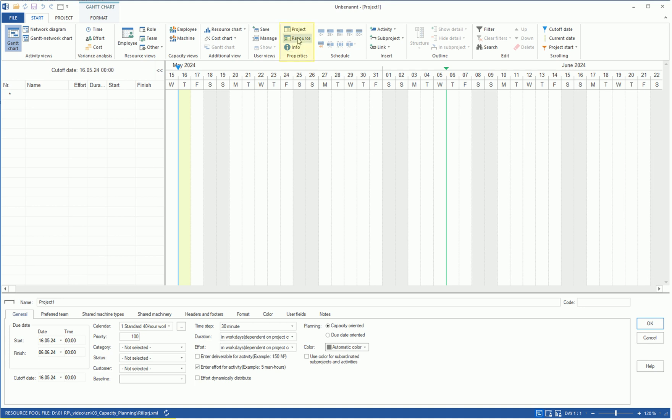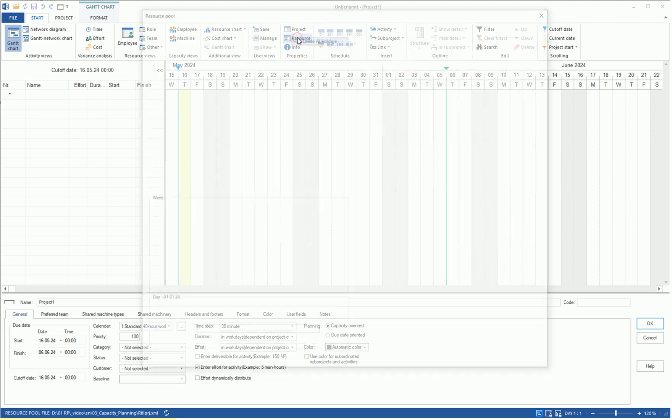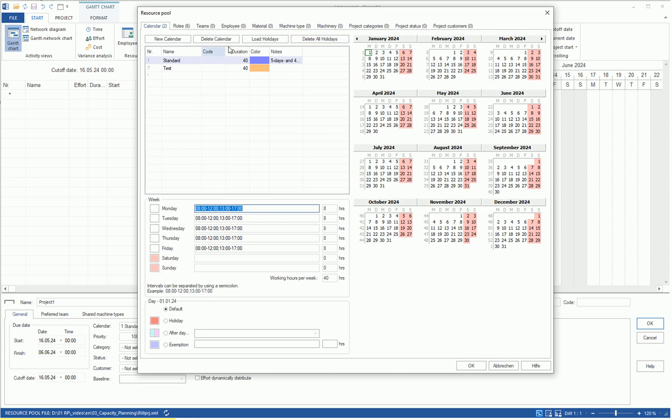We access the resource pool via the menu item Properties Resource. In the calendar tab, we have defined the working hours of the personnel resources, including weekends and holidays.